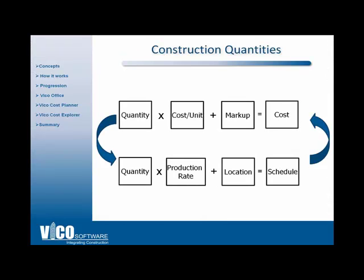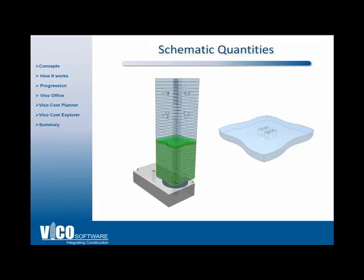Let's start with a recap of the concept behind 5D BIM and the concept behind using quantities for model-based estimating and model-based scheduling. As we discussed in our earlier courses, the quantity is the key driver of cost and of an accurate schedule. You can see on the top that using quantity with a unit cost and a markup you can get to an accurate estimate, and on the bottom, how you get to an accurate schedule by using quantity with production rates distributed across locations. Today we'll look at how these quantities can be used from the onset of the project using schematic quantities.